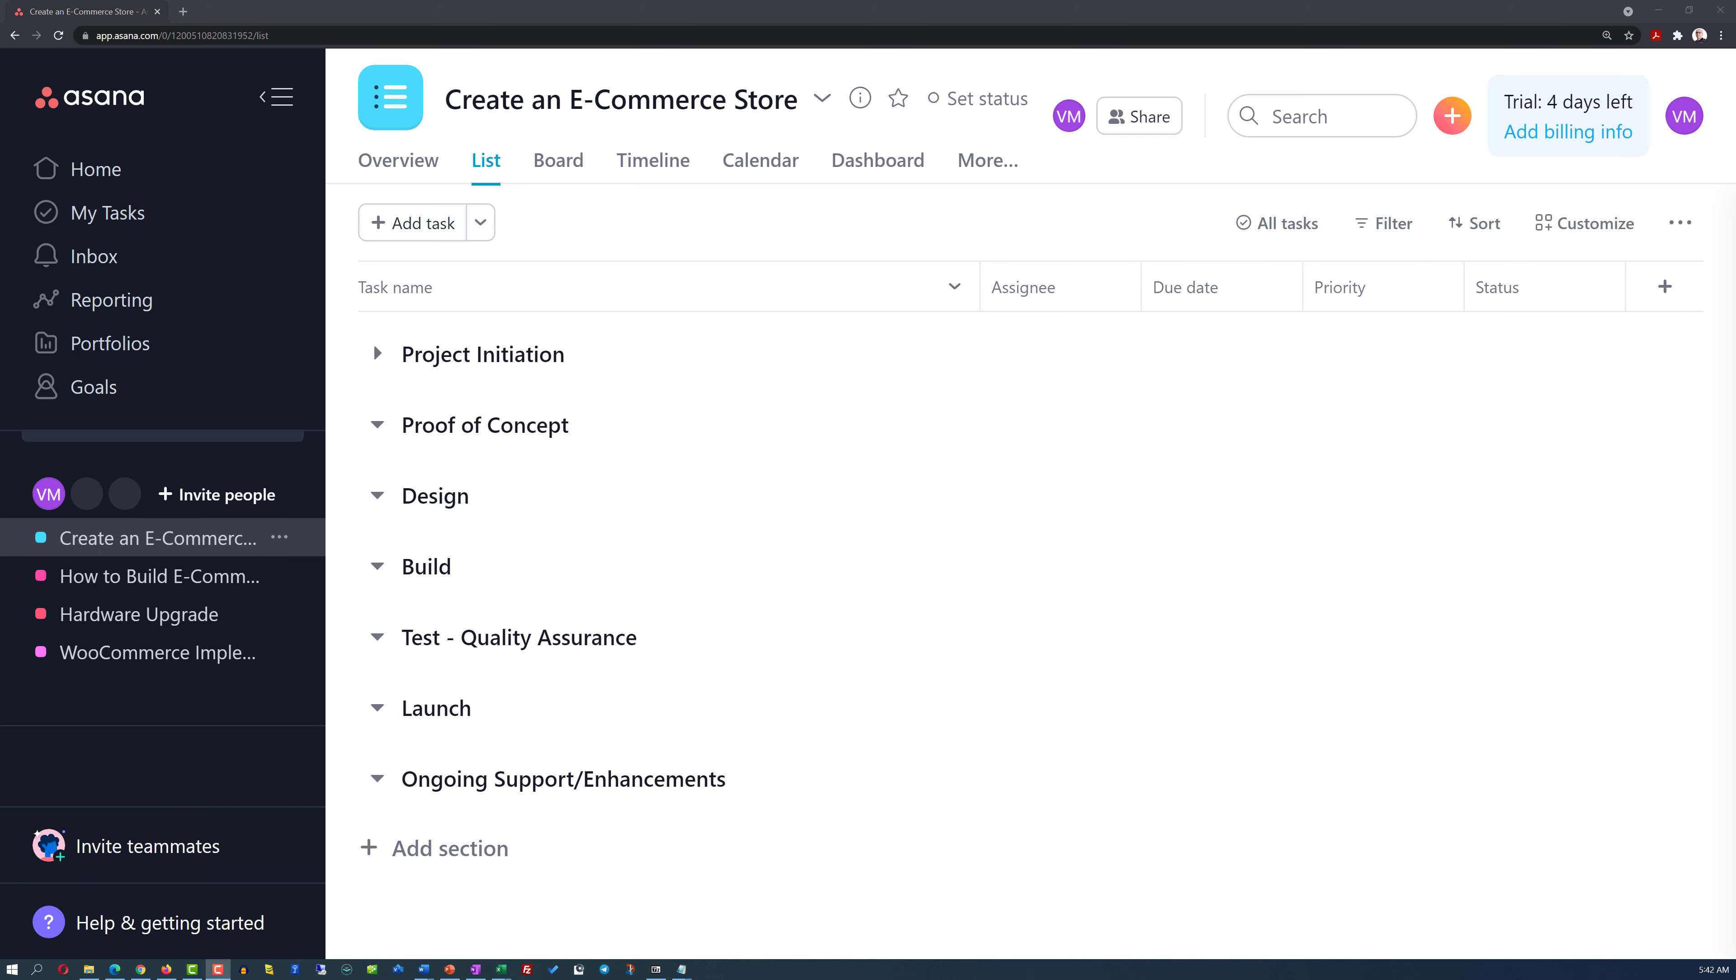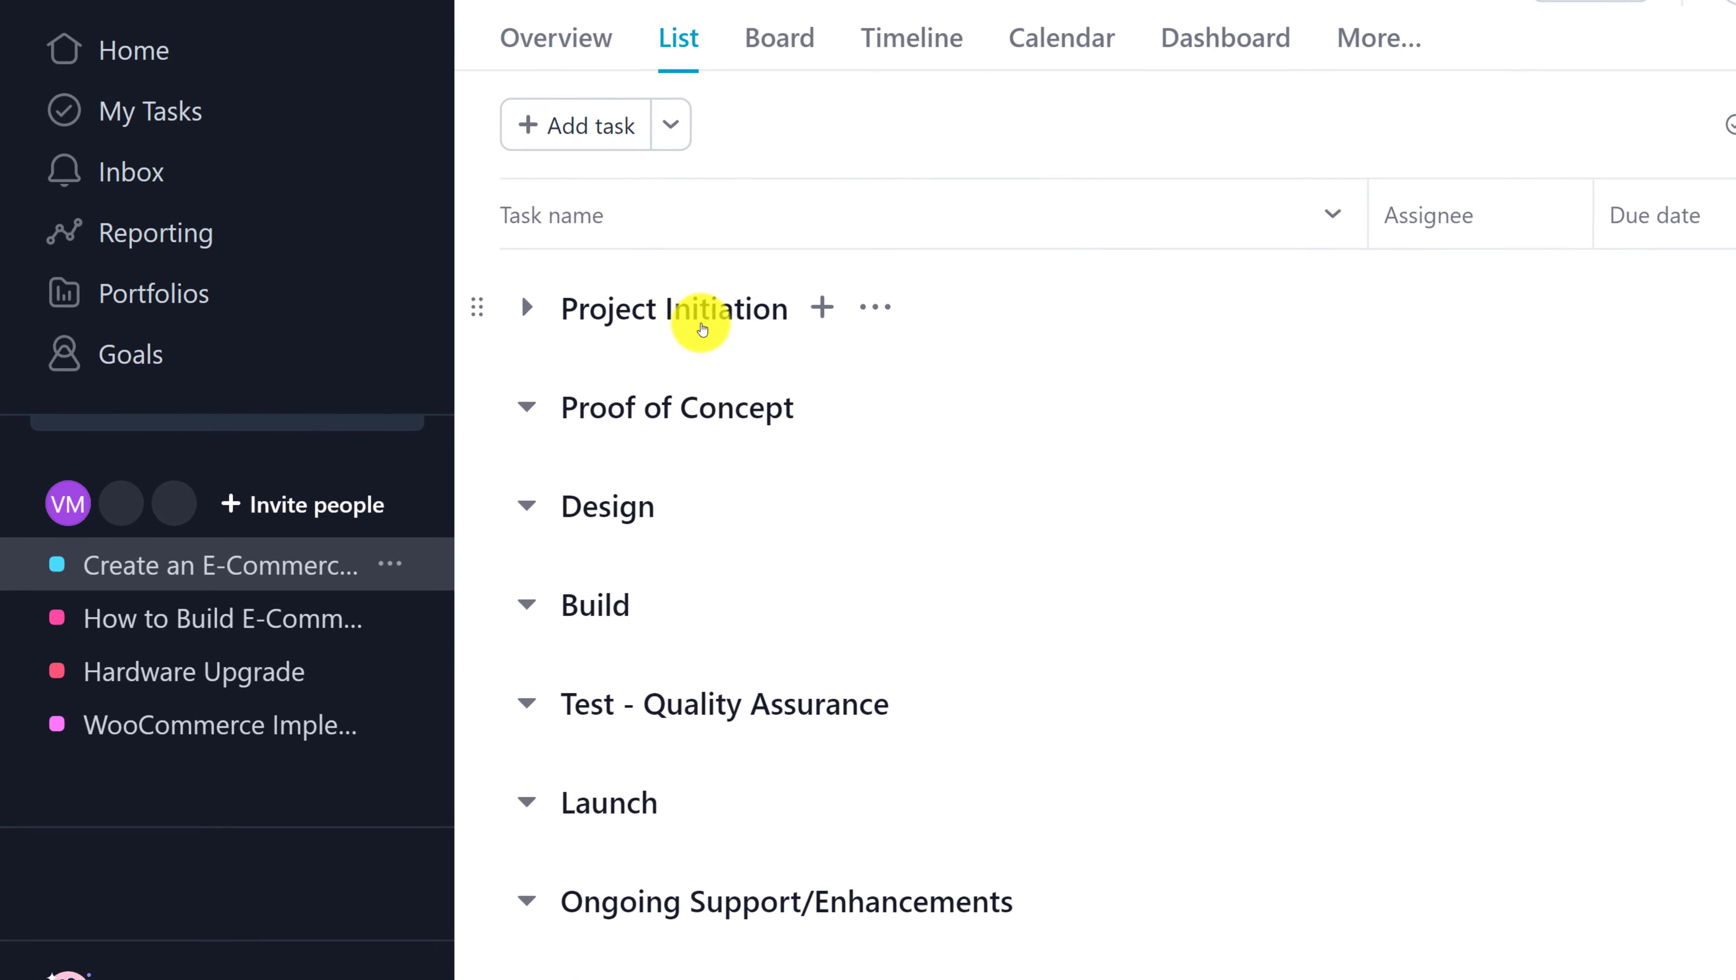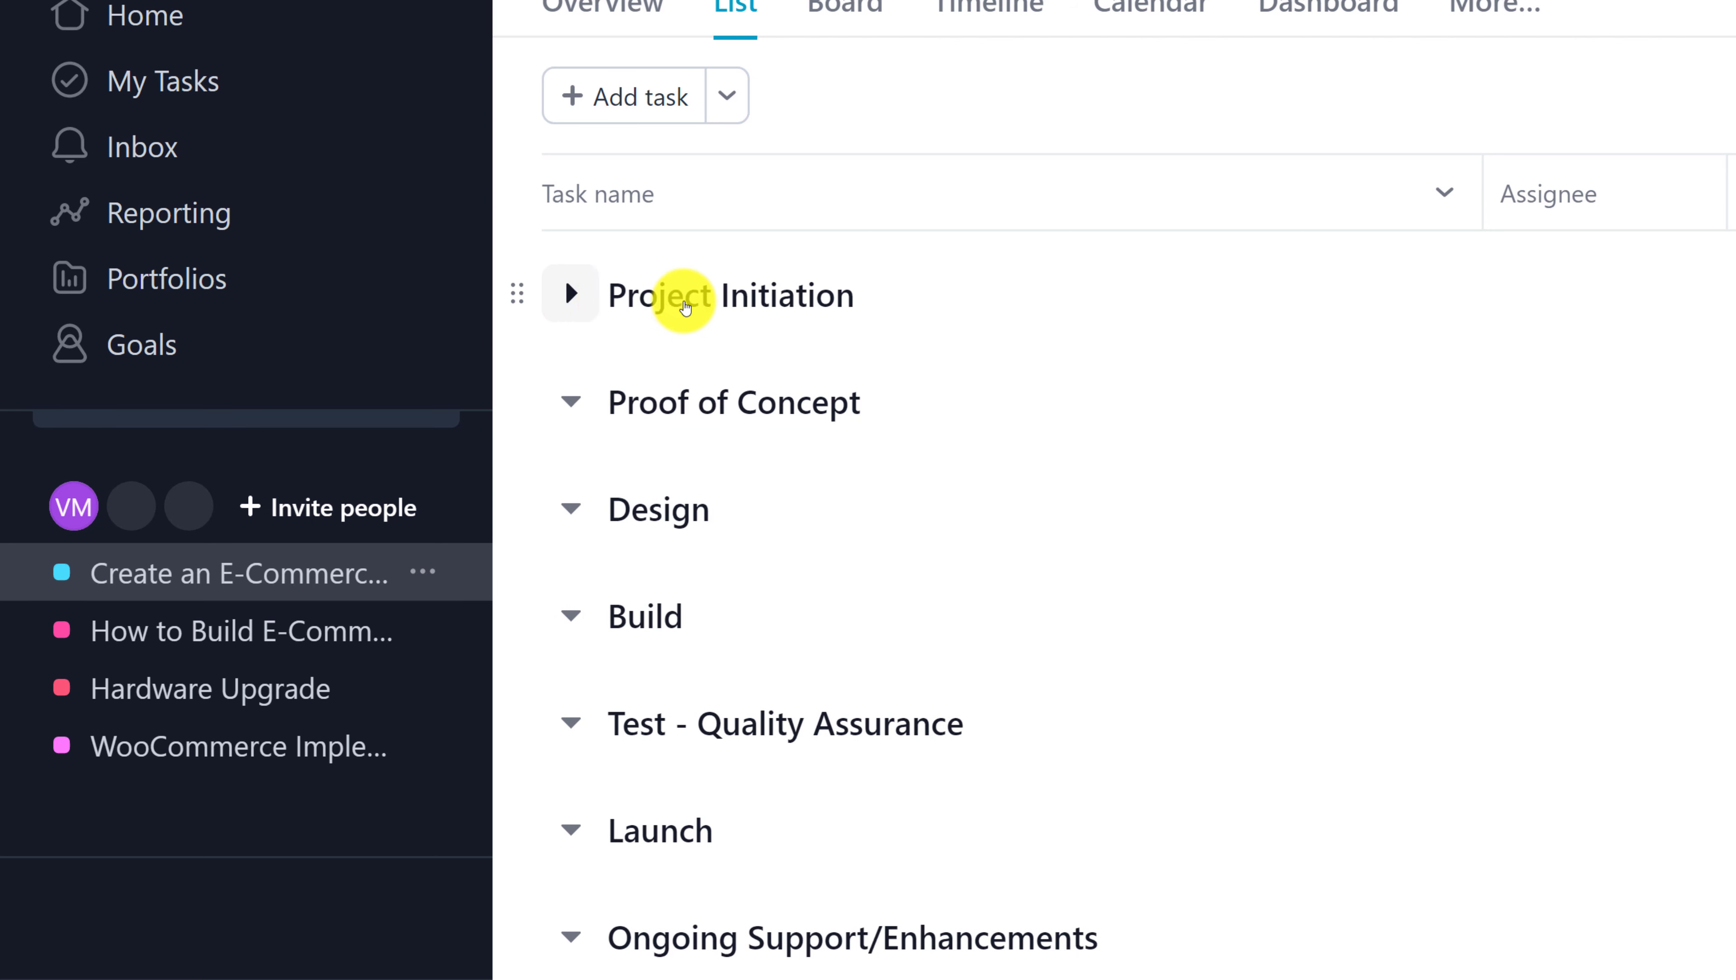Now let's take a look at how to create an effective e-commerce project plan in Asana. One of the best ways to organize projects in Asana is typically by creating project milestones and then putting tasks under each milestone. For example, in this project, there are seven milestones.